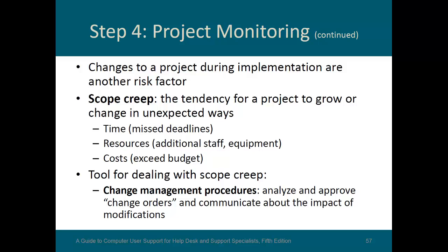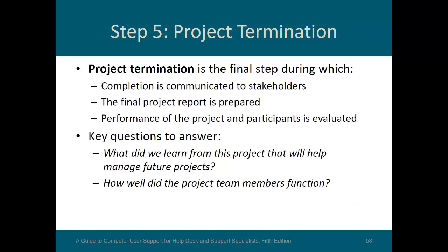So tool for dealing with scope creep, change management procedures. Get together with everybody, analyze and approve change orders, and communicate about the impact of modifications. Tell them how much more this is going to cost and how much more time you're going to need, so that way all expectations are being met.